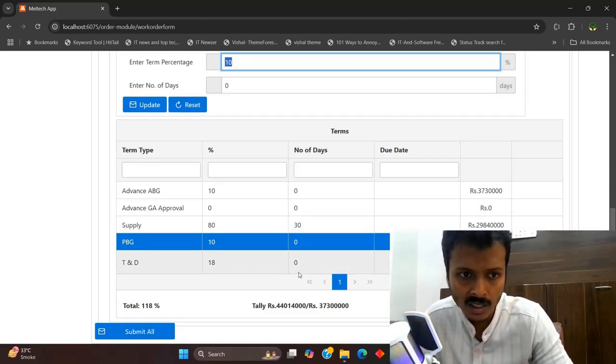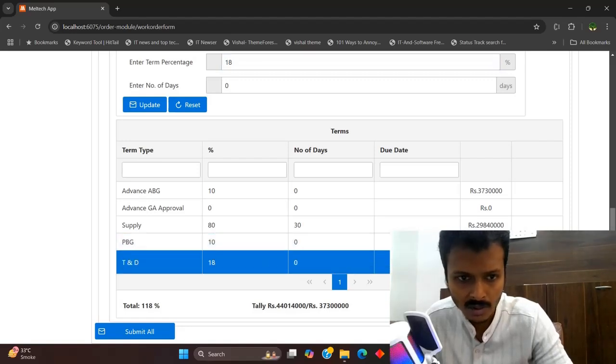And then come the taxes and deductions, which is the 18% slab, levied on top of the project. As you can see, the actual crane price is 3 crore 73 lakhs or so, and then after the taxes, this is the amount. And this 18% tax that you have levied on top of it is shown in here.